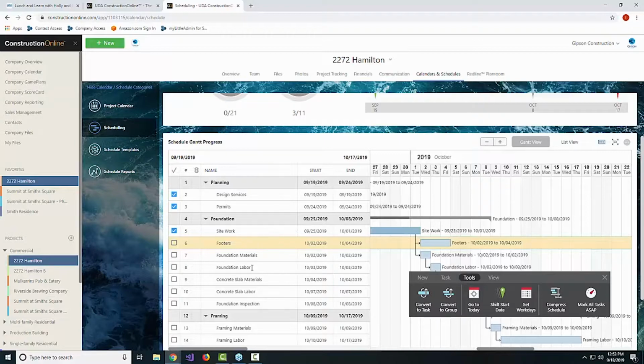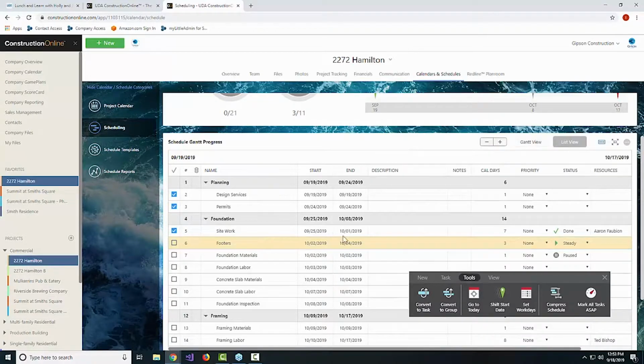But usually it's about two things. One, making sure that your next few tasks, maybe look ahead to the next week, have start dates that still seem correct based on the tasks that are currently running. Are they steady? Are they running the way we want? Are they headed towards a completion on time? It can be great to use the percentage completion for that, because especially for longer tasks, if you're expecting 2 weeks and you're 1 week in and at 20% complete, you just want to evaluate whether that's accurate or whether anything coming down the line needs to be updated. And that's really all the updates require.